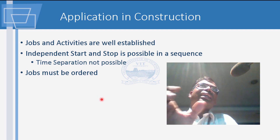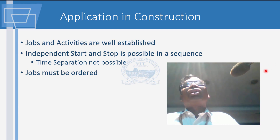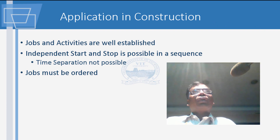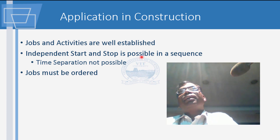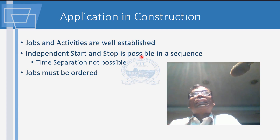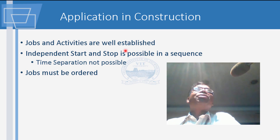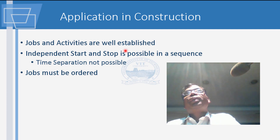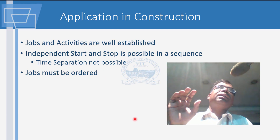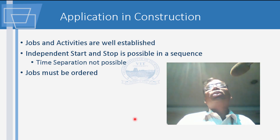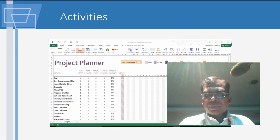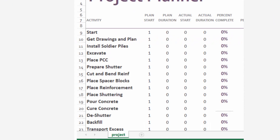One limitation is that time separation — giving too much lag or lead — is not easily represented in these diagrams. However, principally, whenever you have an ordered sequence, these methods work well. In construction, activities are sequential, making it quite amenable to these network techniques.